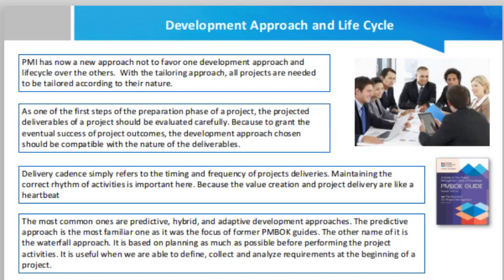For this reason, PMI now has a new approach — not to favor one development approach and lifecycle over the others. With the tailoring approach, all projects need to be tailored according to their nature. As one of the first steps of the preparation phase of a project, the projected deliverables should be evaluated carefully, because the development approach chosen should be compatible with the nature of the deliverables.